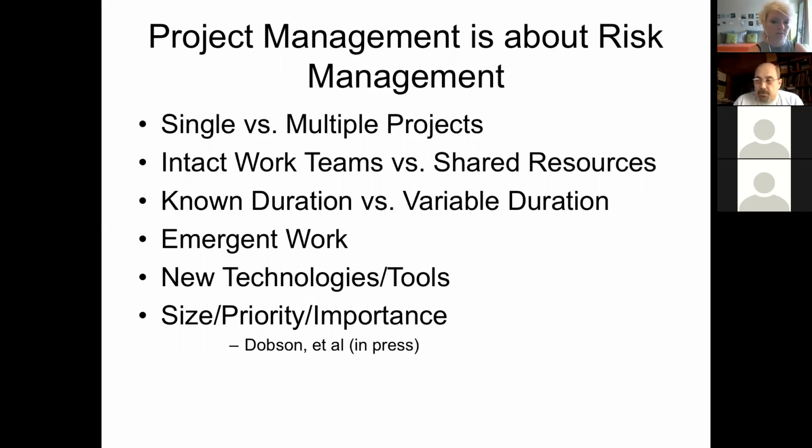And there are lots of sources of risk in a project. First of all, the risks are different if you have a single project versus multiple projects that you're managing simultaneously and your team is working on simultaneously. The risks are different if you have intact work teams versus shared resources. If the project has known duration versus variable duration.